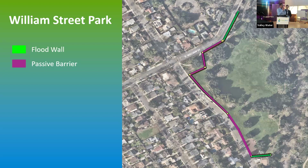Madhu Tumbaluru, Capital Engineering Manager. We are working with some folks at the city. We're looking into the floodgates, which had issues during the 2017 flood and which might have impact after this project is completed. So we identified which locations need to have new floodgates. We're working with the city to make those part of our next phase project. Yes, that's going to be part of phase 2.